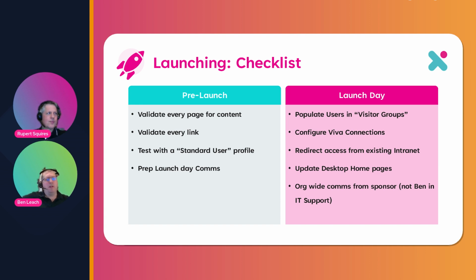Yeah, I think just very quickly, one step we haven't mentioned is, once you've defined what your content is going to be, we advise our customers to prepare a content spreadsheet that the project manager is supporting people to ensure it gets populated. When you've thought about all those questions that Rupert's talked about, compile that into a spreadsheet that is going to form your content plan in that project launch, and as you're working through that, people are setting aside the time to go through and do that content, and it doesn't feel quite so overwhelming. It can be broken down more easily.